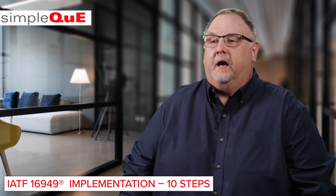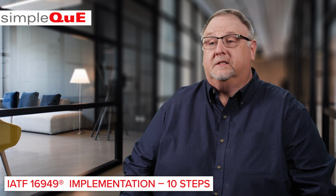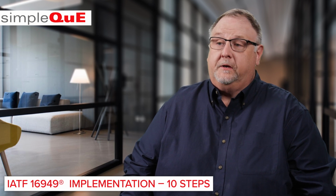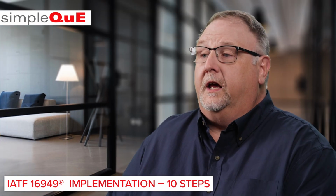IATF 16949 Implementation Plan. The 10 steps needed for IATF 16949 certification. Step 1, develop an initial Grand Master Plan that includes timing, responsibilities, gate output, review milestones, basically a project plan. Step 2, define responsibilities. Who will be the site champion and the process ownership. Step 3, define IATF requirements and training those responsible personnel.